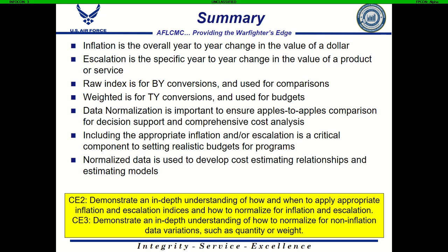If you are over capturing escalation on something that doesn't actually escalate, you could be tying up excess funds in a program where those funds could be used for other things, which is potentially detrimental to national security. So we want to make sure we're being as accurate as we can and as reasonable as we can. And again, we use the normalized data as the building block for developing cost estimating relationships, and even our estimates themselves. We almost always start with some normalized cost data to build a cost estimate.